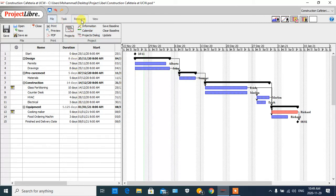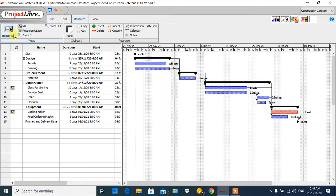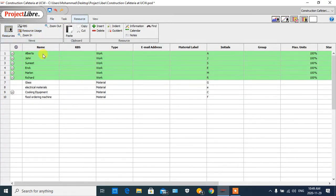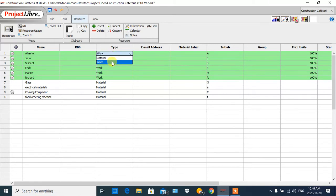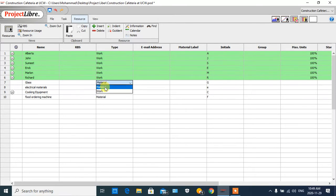For the resource, in the toolbar I click on 'Resource' and then 'Resource Spreadsheet.' As you can see, we have defined some workers here and also materials. For the workers we choose a type of 'Work,' and for the material we choose the 'Material' type. For the RBS, which is the Resource Breakdown Structure, we can categorize our resources into groups.